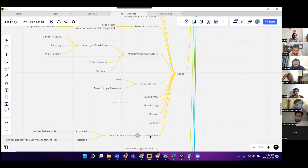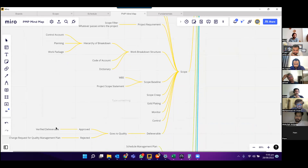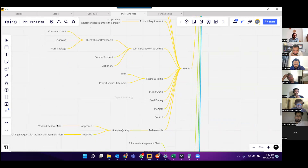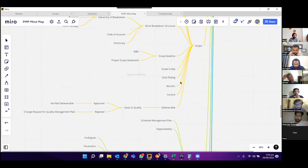We talked about scope creep, gold plating, monitor and control, and deliverables. Deliverables go to quality — if approved, it is a verified deliverable; if rejected, it goes to the change management process for the quality management plan.